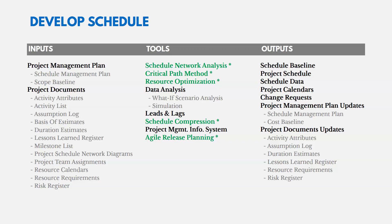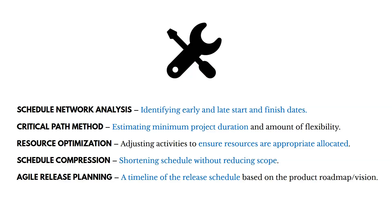Let's focus on the key tools for developing the schedule. Schedule network analysis identifies early and late start and finish dates. The critical path method estimates the minimum project duration — the critical path is the longest path, so if something on it is delayed, the entire project could be delayed. Resource optimization adjusts activities to ensure resources are appropriately allocated — for instance, if one person is scheduled on two activities simultaneously, you need to adjust so they're not over-allocated.